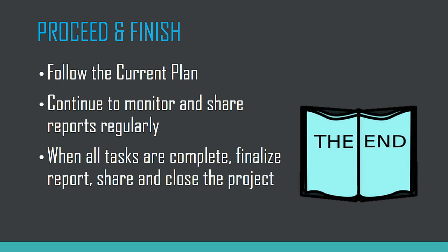Let's get back to our project. Using the new current plan, the project moves forward. It's a continuous process. The current plan will be updated regularly based on actual work performed and any changes that may happen with the inputs. Our reports will continue to tell us how the current plan is progressing in comparison with the baseline, and the project manager will continue to share these reports with the sponsors and the rest of the team as necessary.